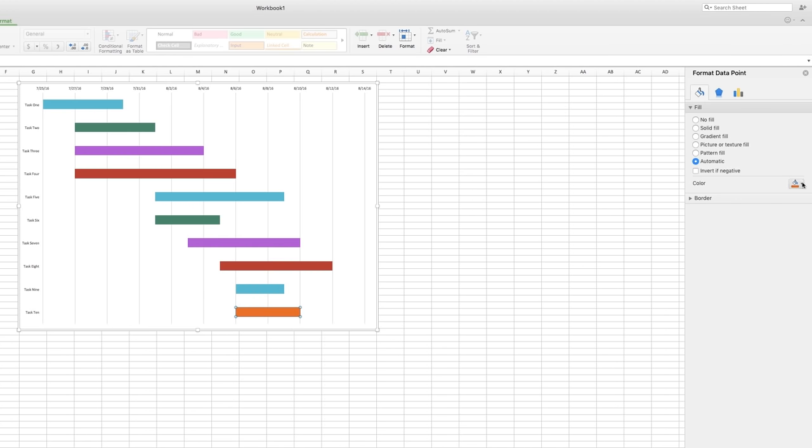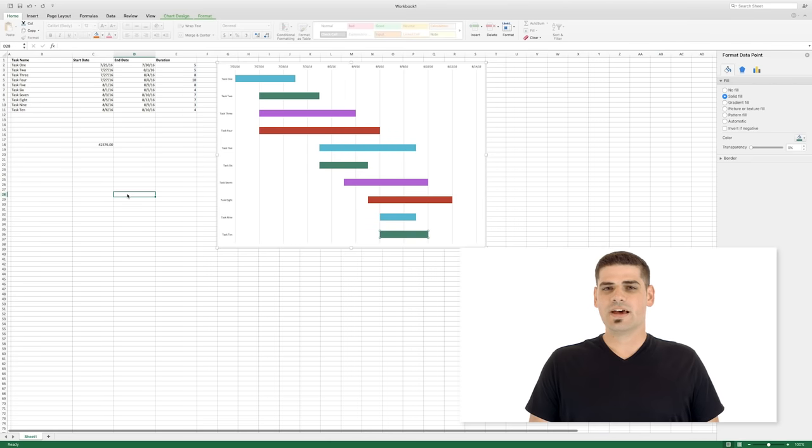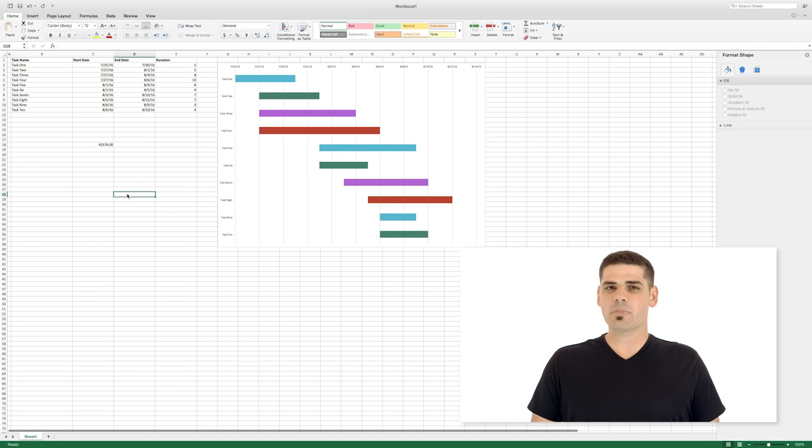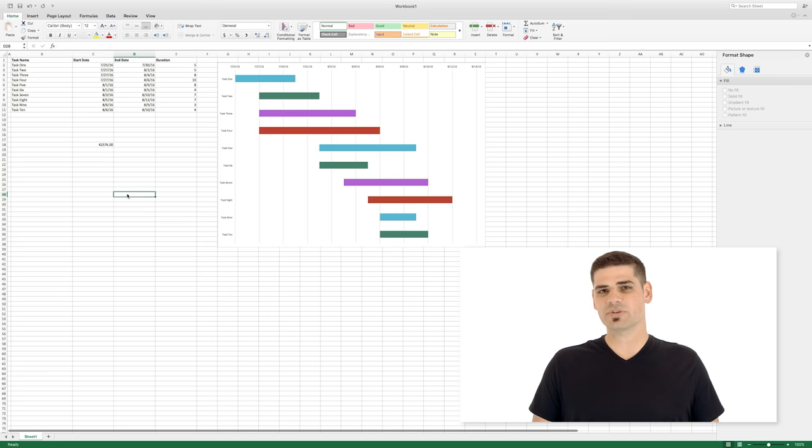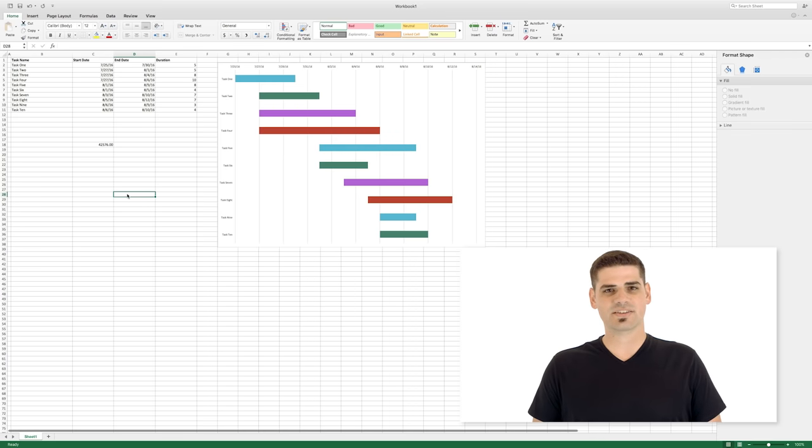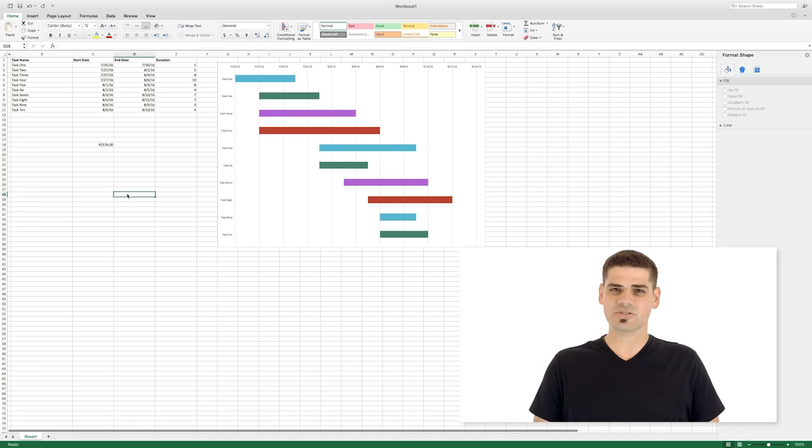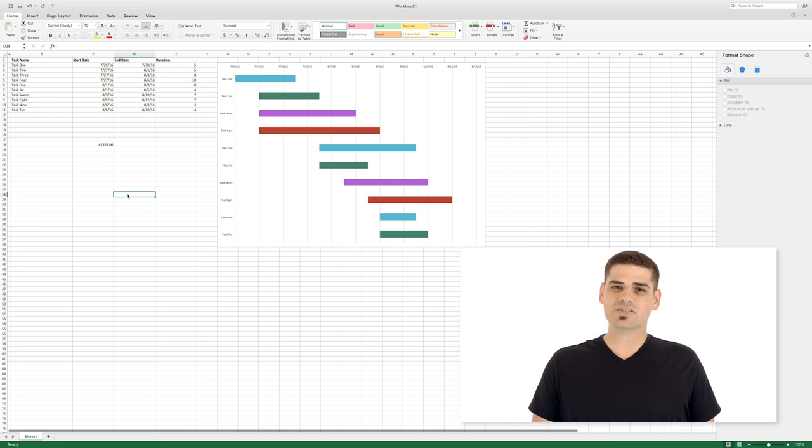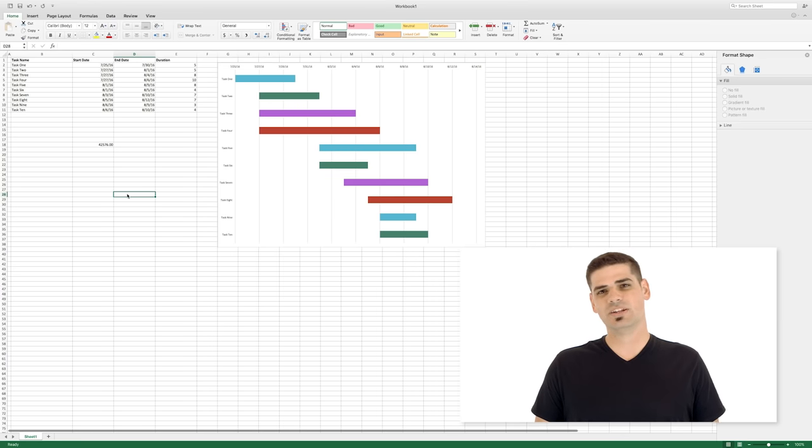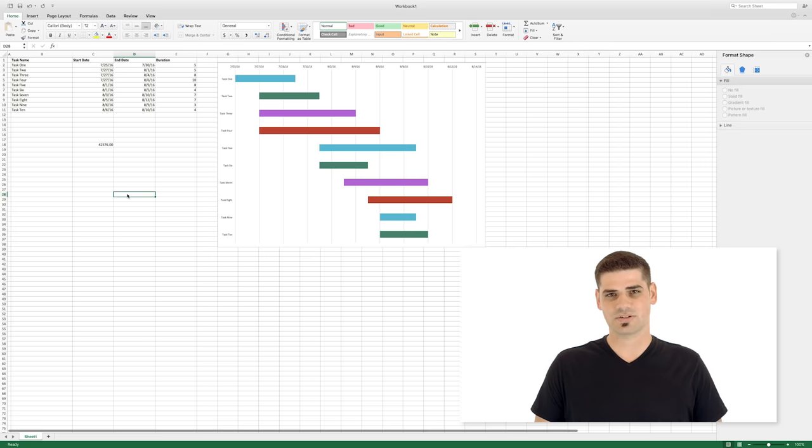And there you have it, a simple Gantt chart in Excel. Now there aren't any robust features here. No dependencies, milestones, or resource management. There's no visual information about the completeness of a task. It's cumbersome to move tasks around, and if your project gets much larger than this, they can get pretty unwieldy. But it is a solution for small projects that won't need to be updated very often, or by multiple project managers or stakeholders.